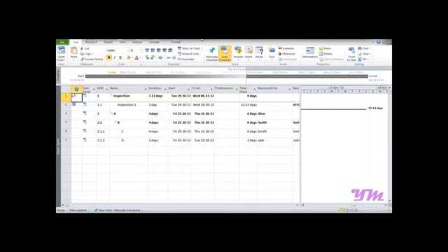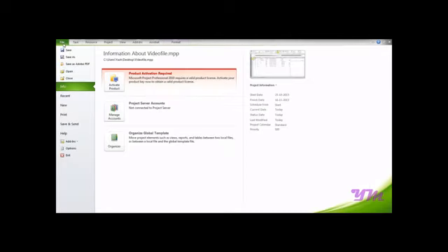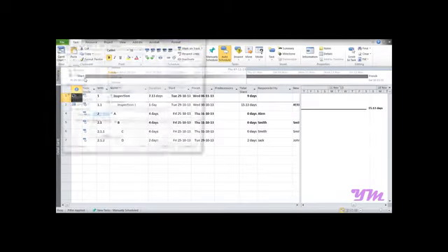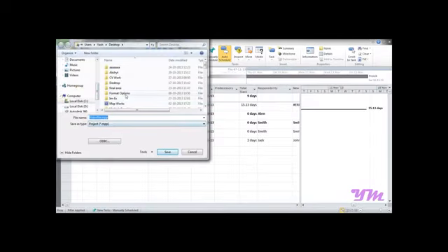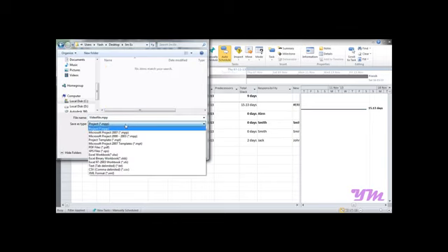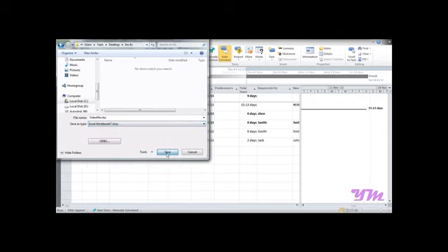Now going on to the third thing, exporting and importing data from Excel. Let's say we want to export this to Excel. So to do it, you can go on to File, go on to the Save As option. Now let's select a folder, that is IMIEX, which I have made for it. Go on to project and select .xlsx and press save.